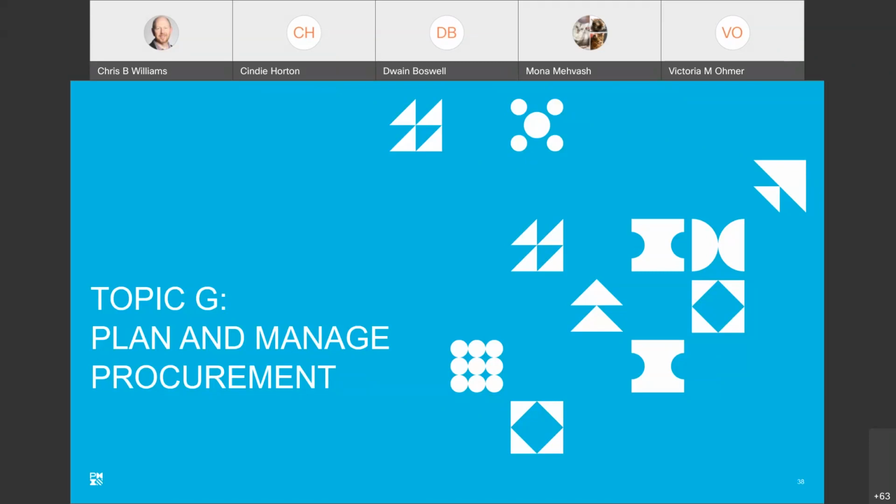So, all right, let's start off with this: as you execute your project, you might need to procure an external resource so you can meet your project's objectives. And that's what we're going to be talking about today. If you're procuring products and services from external suppliers, you have to identify the suppliers, you have to obtain bids or proposals from them, and you have to award contracts based on their evaluation. All procurements for the project must be done within specified parameters of time, cost, and quality, to ensure that the project meets the stakeholders' requirements.